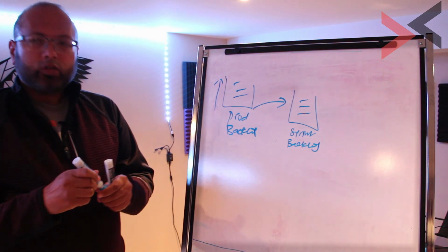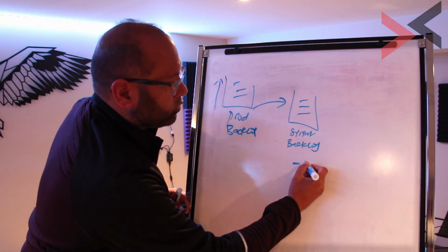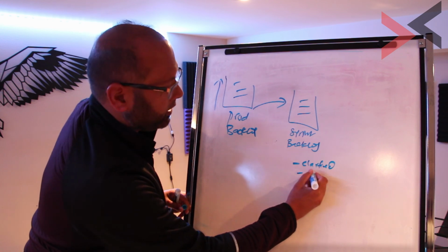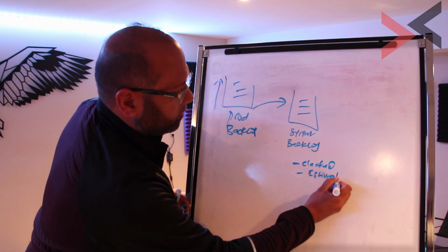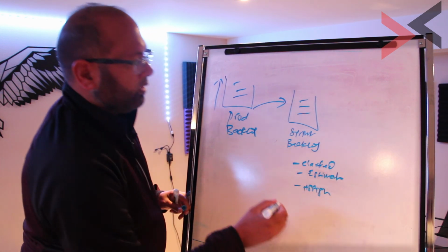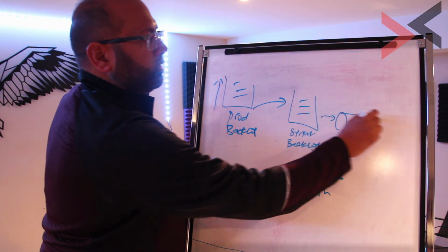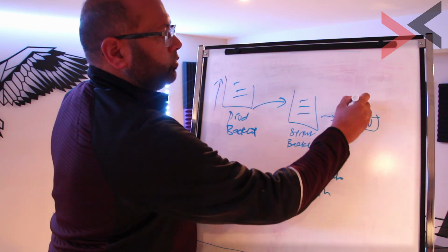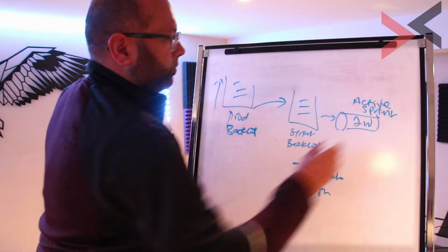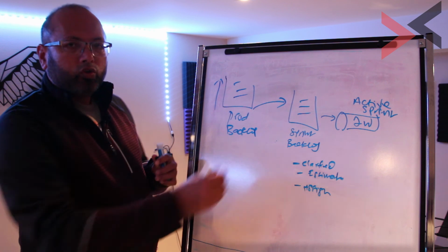Over here is what the team's going to break down into smaller stories. So you're going to get them clarified. You're going to estimate. And possibly you're going to assign somebody to that story or a task in the sprint backlog. And then once you got that clear, you're going to start that sprint, which is 2 weeks, and that becomes your active sprint. So this is the process of how you take the backlog and how you do the planning.